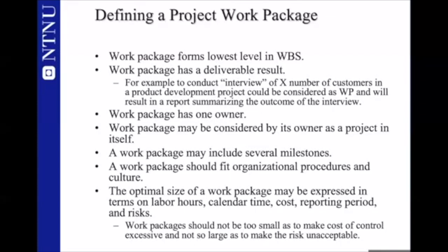But another characteristic is that it must have what we call one owner. What does that mean? It means that I must be able to give this work package to one person. Let's say Ina. Ina, you are in charge of this work package, which means that Ina is, in fact, the project manager for this work package. She must be able to decide how it will be done and who will be doing it within her team. Of course, she has to coordinate, but she is the person responsible for the project.